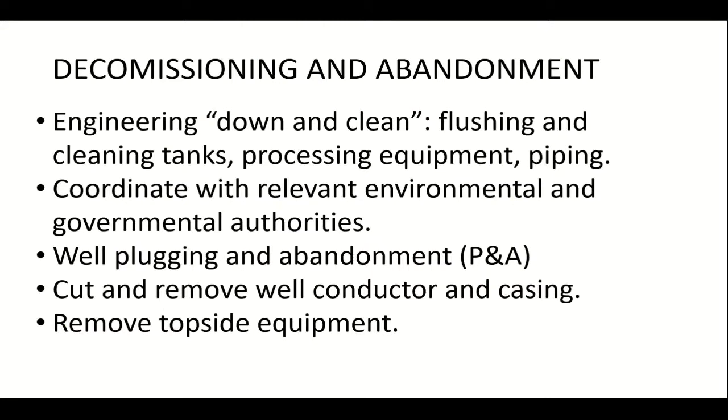Abandonment and decommissioning, the task essentially is clearing out, trying to clear the area to what it was originally. Some things that are performed just after shutdown are engineering down and clean, trying to flush and clean tanks, equipment, and piping, because I don't want any release of flammable and toxic substances to other places, like the sea, the environment.